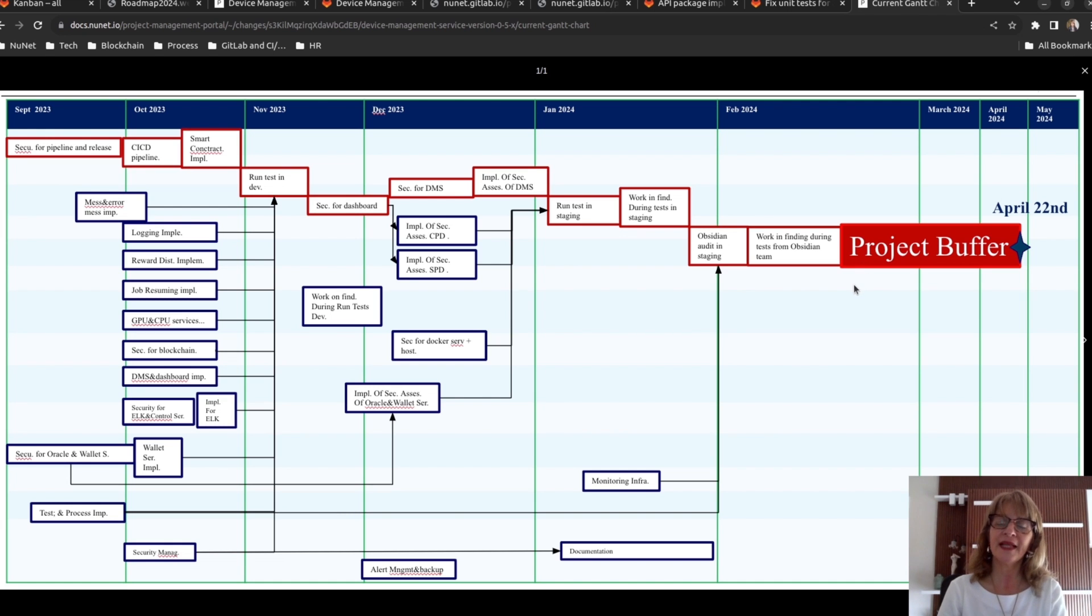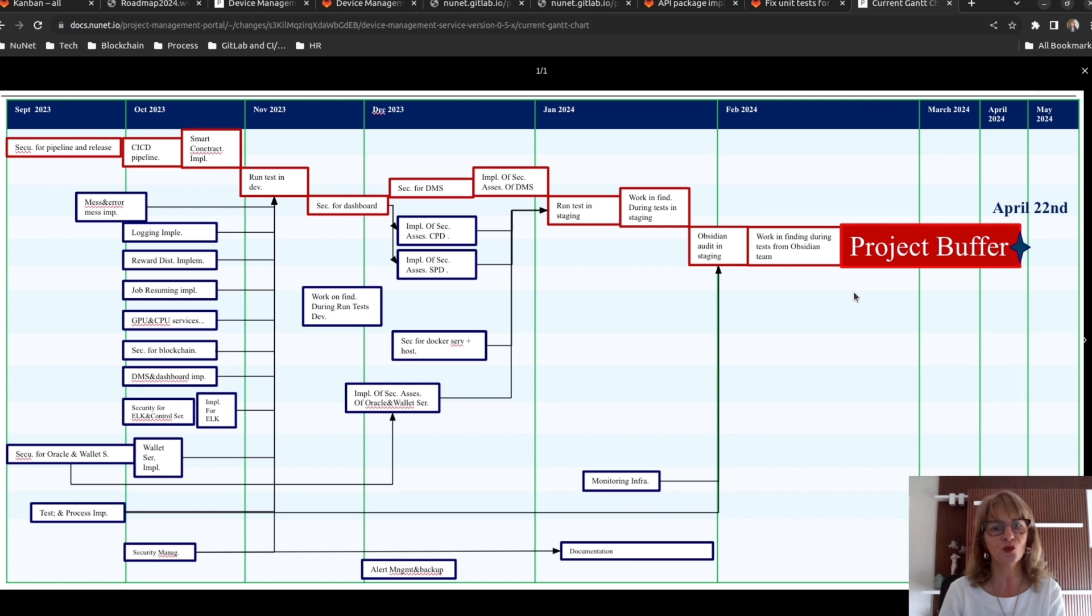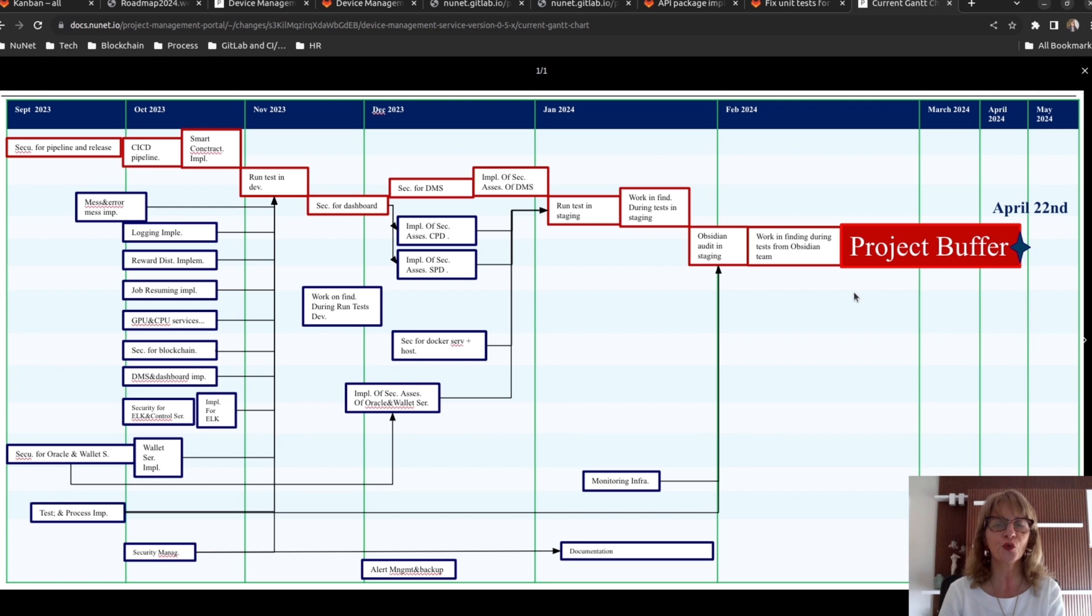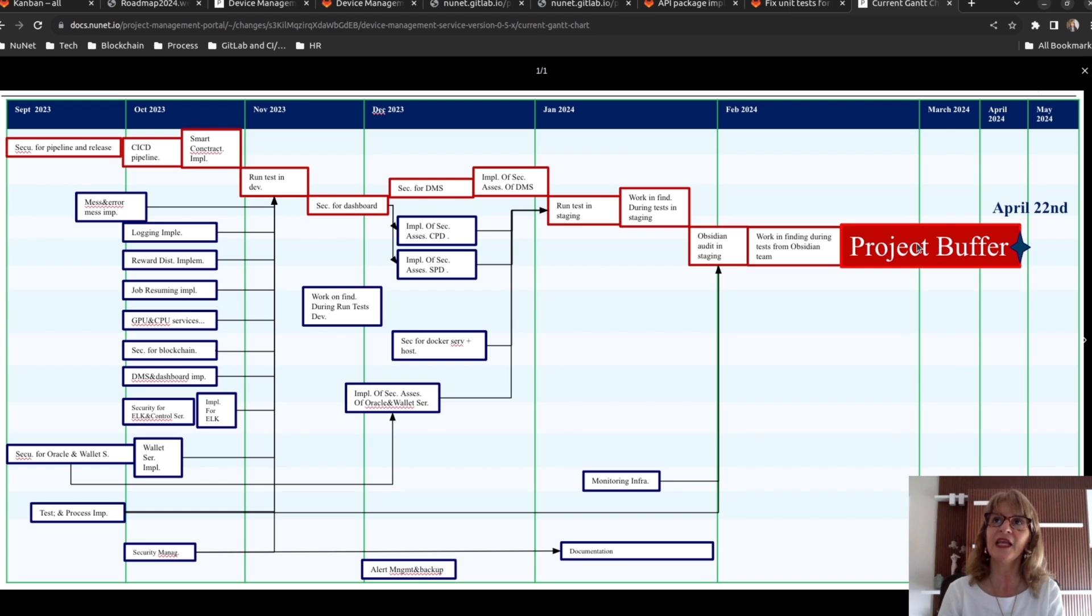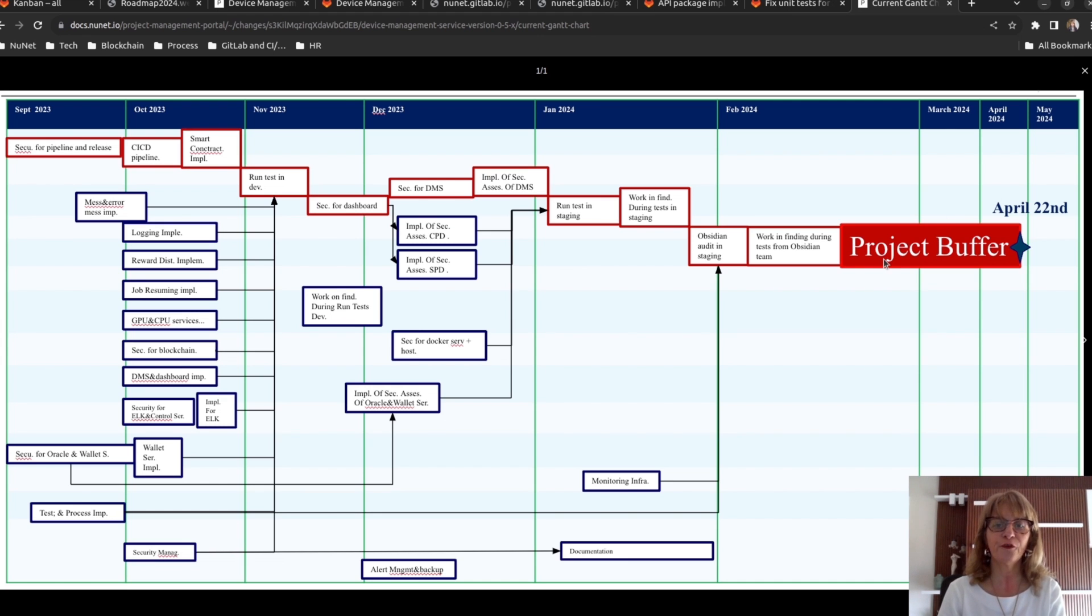And a simplified one showing the project buffer at the end of the project. Remember that we used focus duration while estimating task duration. And they don't take into account the probable problems during execution. So, the CCPM methodology inserts a project buffer at the end of the project as shown here. The project due date is therefore the end date of the project buffer. In this case, April 22.